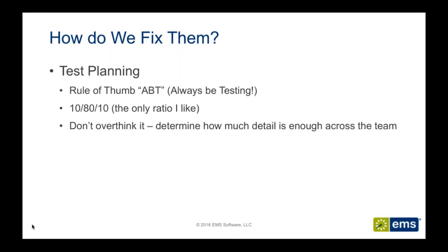So I tend to get to the point where 10% is test planning and management, actually writing the tests. 80% of the time should be actually testing. When I say testing, it's a combination of executing tests via a test management tool. Some people may call that manual testing; I'm not a fan of that term. It also includes executing those tests via a tool or by a human, but also in an unscripted manner, which would be more exploratory and ad hoc testing.